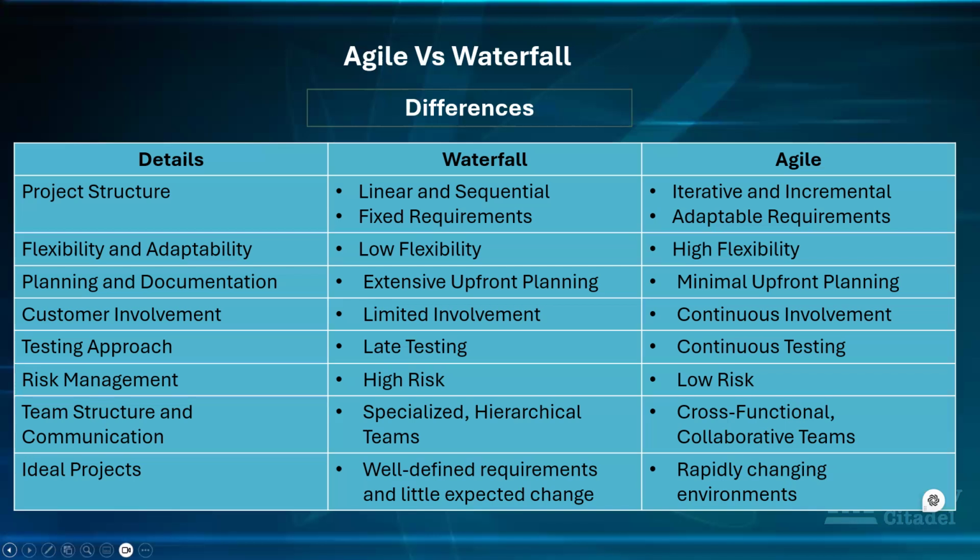So every sprint, there's development work, there's testing work, bugs are raised and fixed, even at times during the sprint when it is critical. So everything is continuous, everything is working together as they go along, so that at the end of that sprint, there is a potentially shippable and workable increment being added because it has been tested and validated. So at that point, the incremental value added at the end of the sprint is workable and shippable.